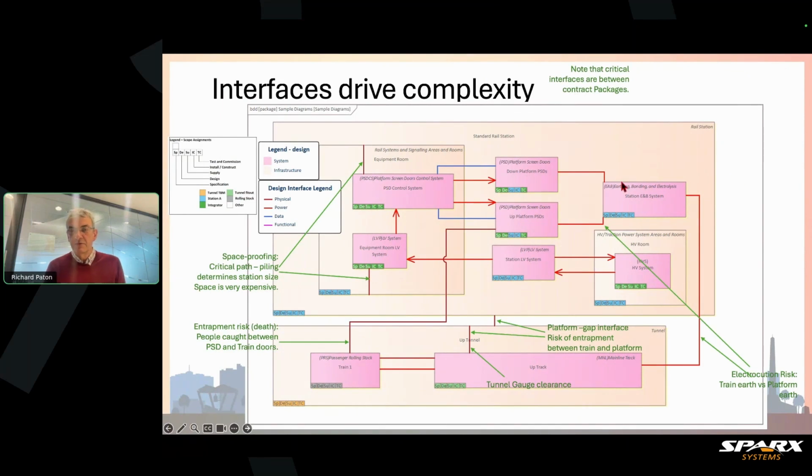Those systems there are as far as we go with our modelling, and the reason is because there are discipline engineers who work in LV or in track design or in platform screen doors or whatever, and they will be producing a design pack. And a design pack can be anything from 100 to 4,000 pages long, depending on the complexity. And they will use whatever tools for their discipline to be able to design their thing.